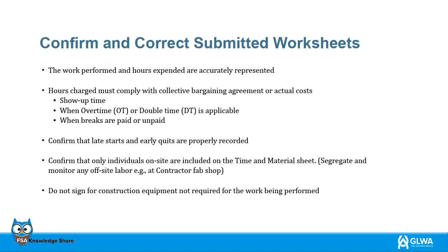Furthermore, GLWA site representative can cross-check GLWA daily records with the contractor's daily logs to ensure the following: the work that the contractor is performing and the hours spent are accurate. The hours that are being charged have to match the actual costs. What time did they show up and if overtime and double time is needed, and paid or unpaid breaks.